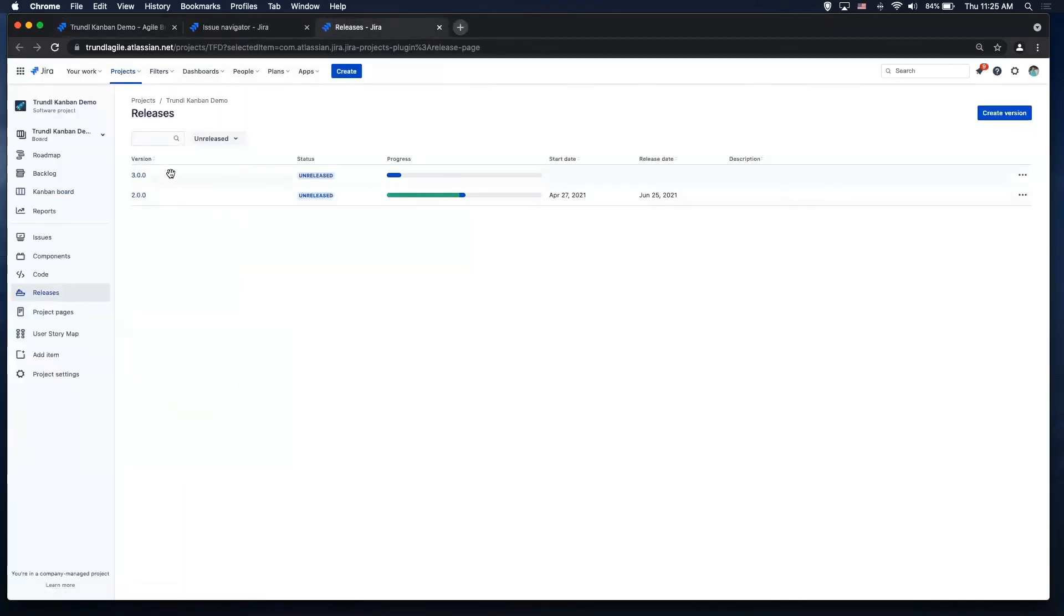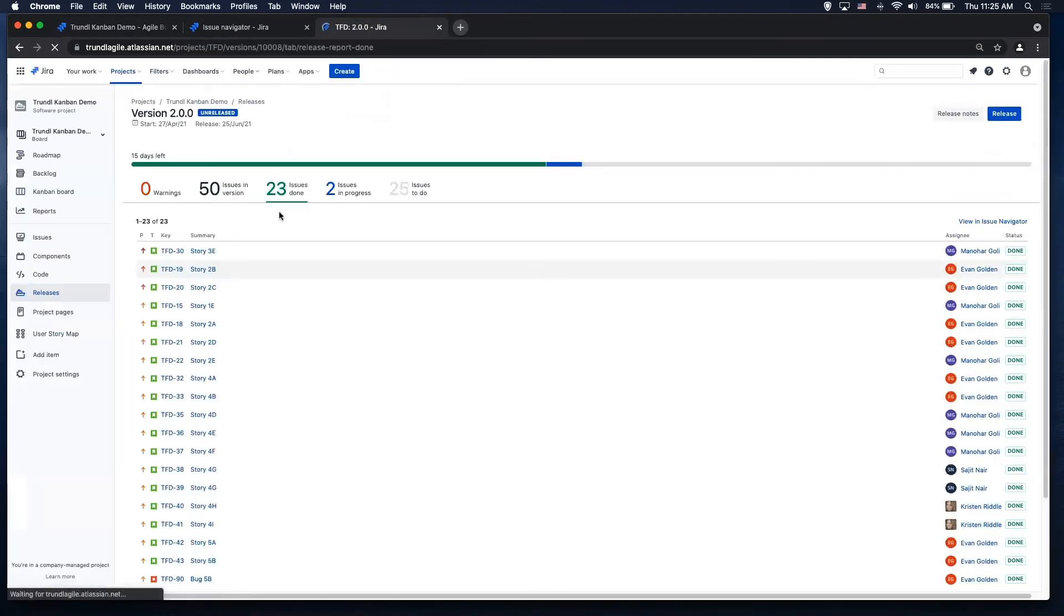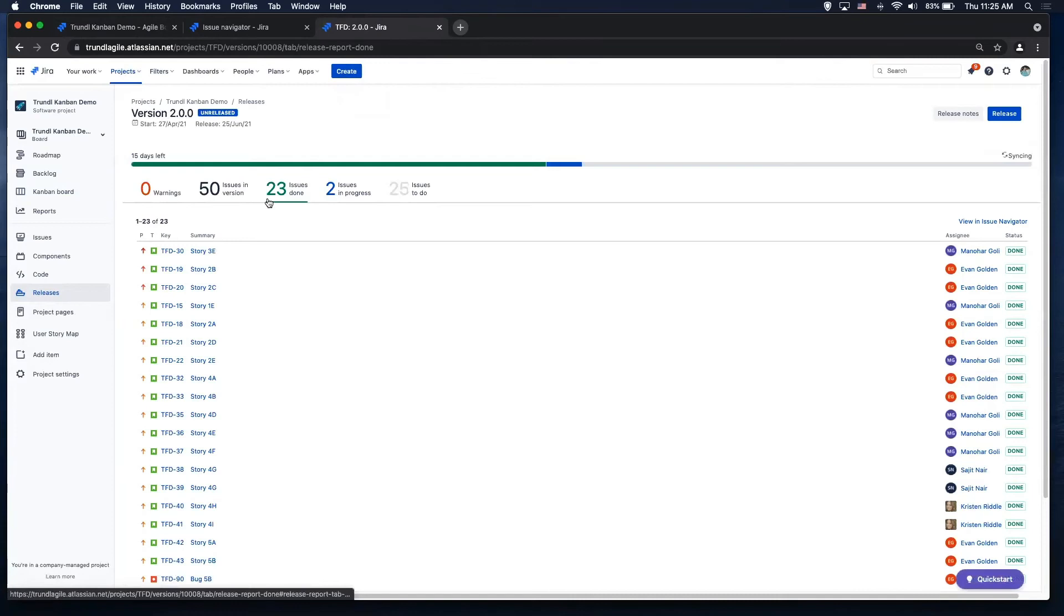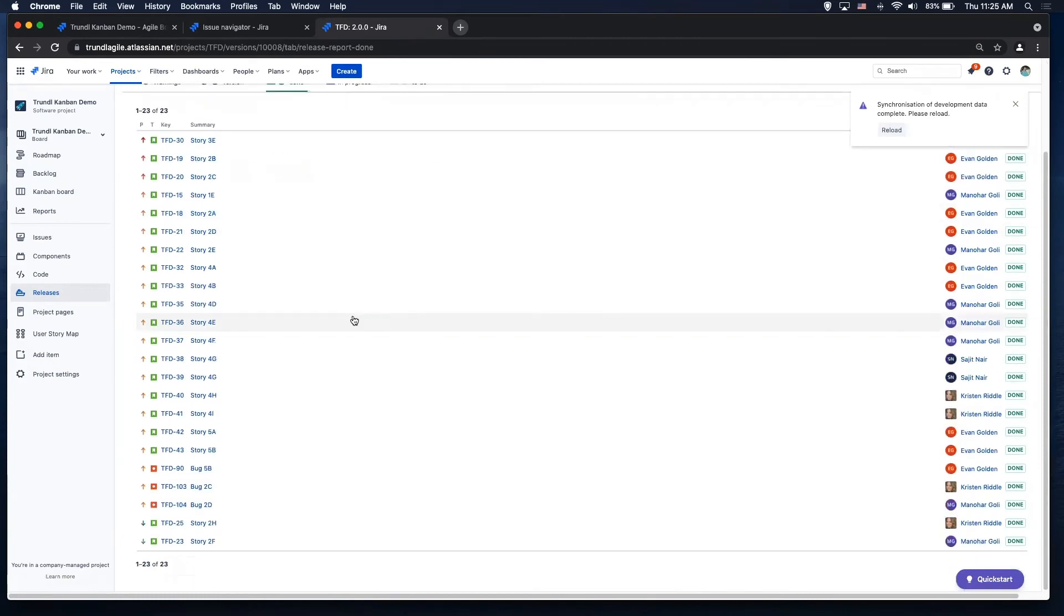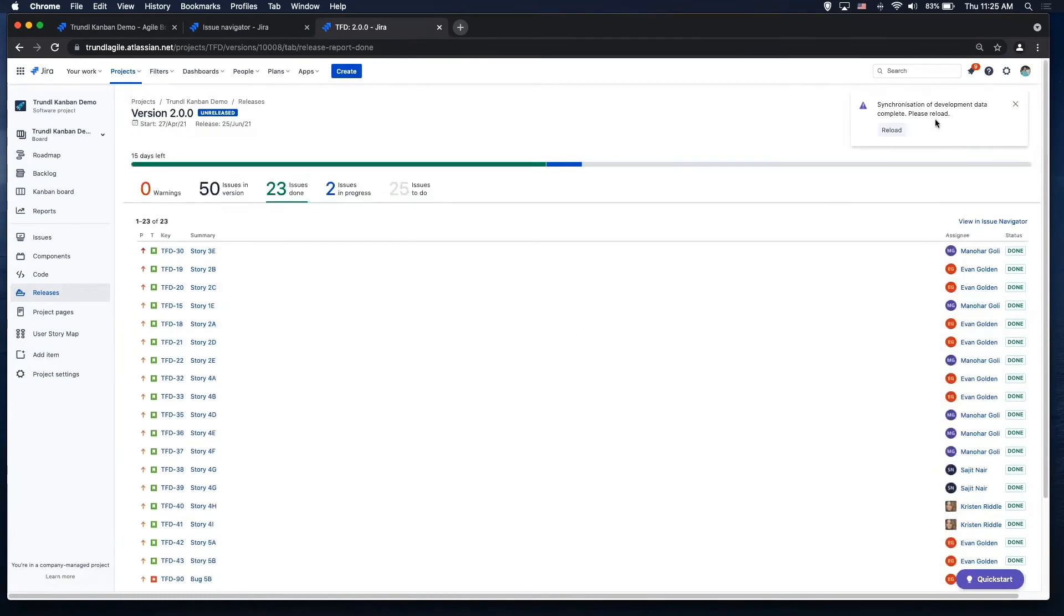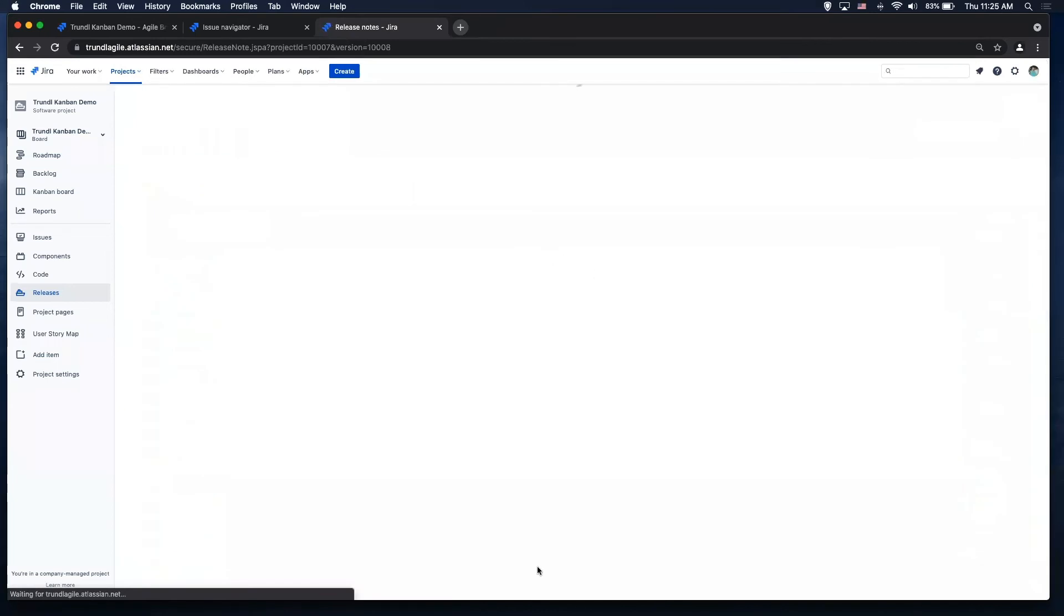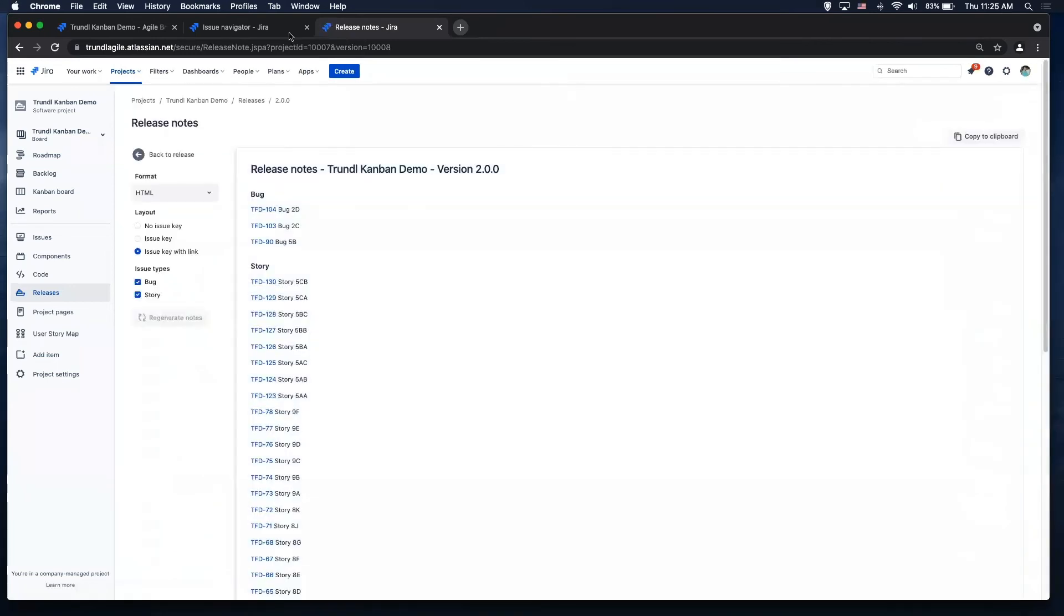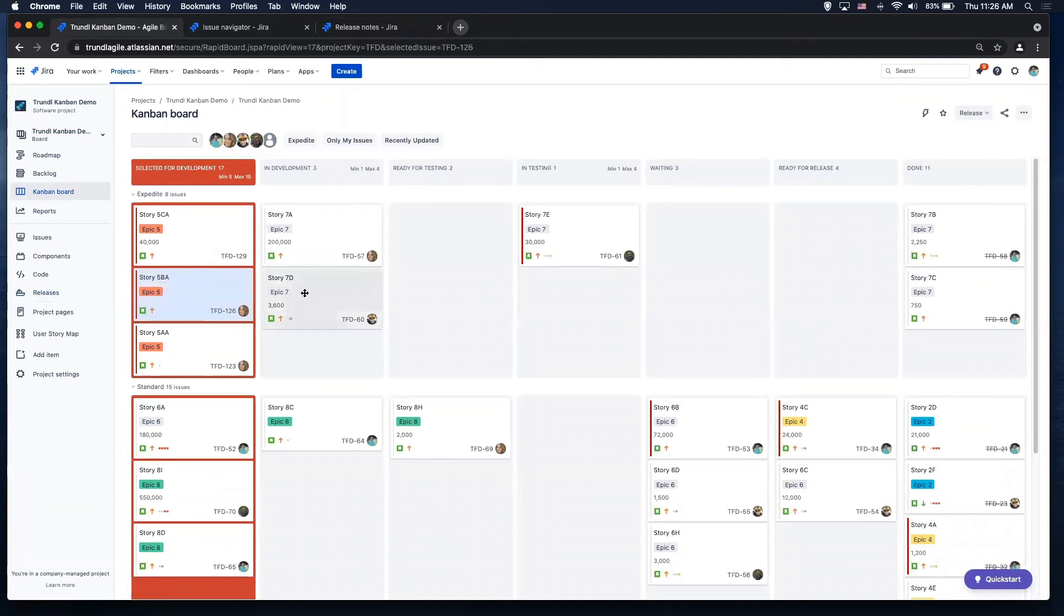And then in my release hub, you could see my releases. I can click on 2.0.0. It's going to give you all the details of 2.0.0. There's 50 issues in the version, 23 are done, two are in progress, 25 are to do. Gives you the list of all of them with all the details you want. And it also gives you release notes. So you get the release notes right there as well. So I can release from the board and then I can use the release hub to visualize my release notes and all those important things that you need to see.